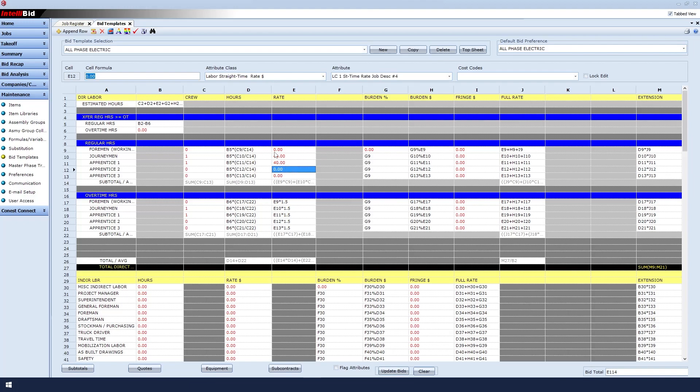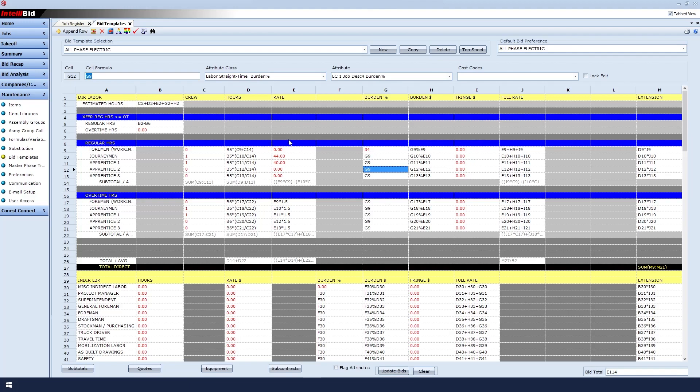If these values do not include the burden, I can enter the burden percentage in column G. Maybe I have another 34% for the burden. We can also include things like vacation pay, holiday pay, and more, but we will assume that is included here.